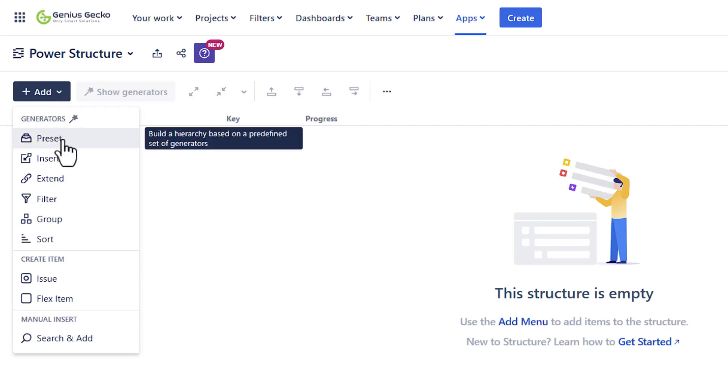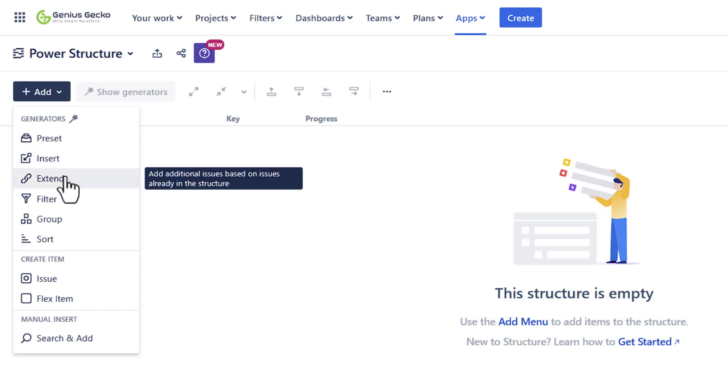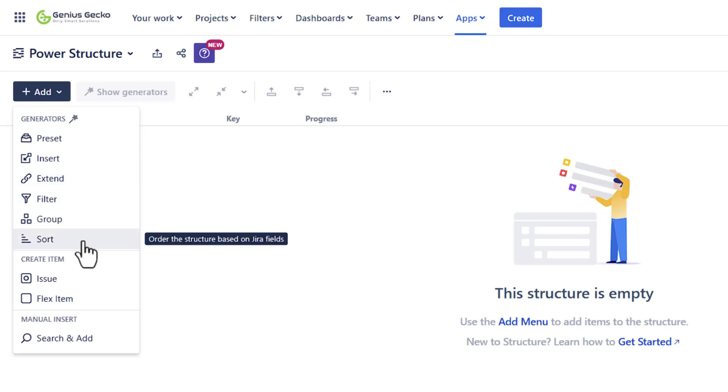There are some presets that you can use if you don't want to define the structure from scratch. You can insert issues or decide which issues from JIRA will be added to your structure, extend the structure or add additional issues based on issues already existing in your structure, filter or remove issues, group and sort.